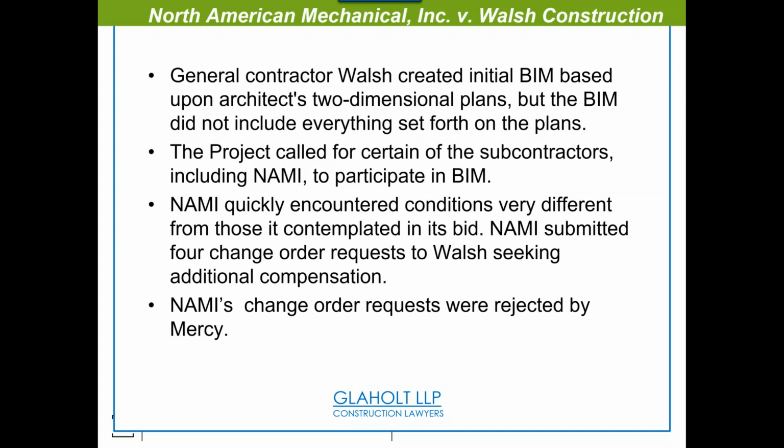The good news is there hasn't been a lot of BIM litigation on the record. Here, in this case, the contractor created an initial BIM based on the architect's two-dimensional plans. The BIM didn't include everything that was on the plans. Then the subcontractors were brought in to participate in BIM. One subcontractor, NAMI, encountered conditions that were different from those in the bid and submitted change order requests to the contractor, Walsh, and the requests were rejected.